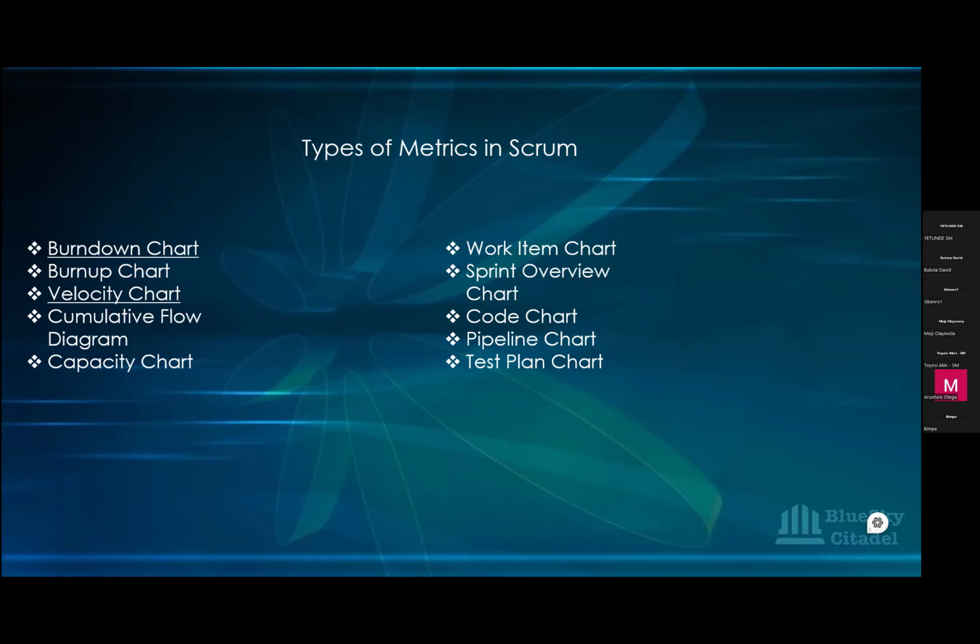So once they come to you, the Scrum Master, you find that you're not able to get that information from them. That's a blocker, isn't it? That's an impediment for the BAs. Now you need to do your work in resolving that blocker. You escalate to the ADM: this is what my BAs are not getting.